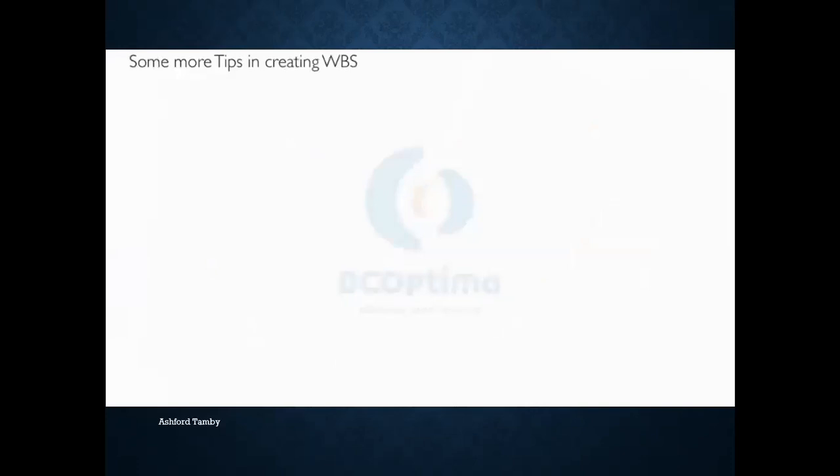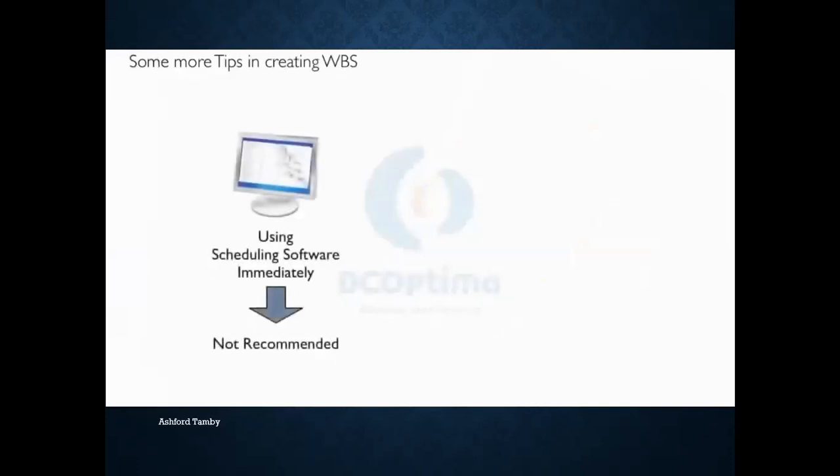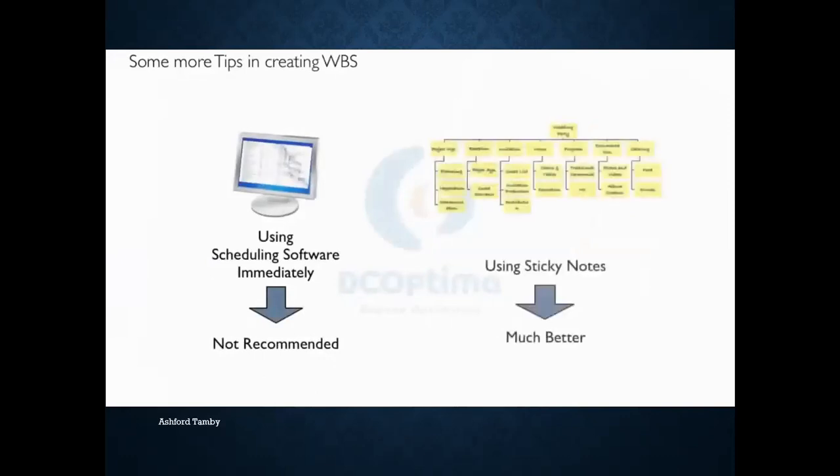Second, don't jump to scheduling software immediately in creating a WBS. It could limit creative thinking and lead the team to overlook some of the necessary deliverables. Using sticky notes is much better. It stimulates the collaboration process and gives the opportunity to have a helicopter view at the same time.